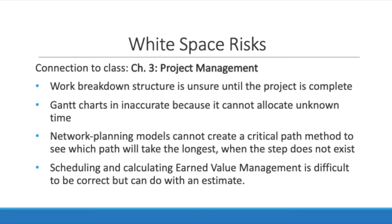This connects to Chapter 3, project management. You can't do a work breakdown structure because it is unsure until the project is complete — you are uncertain of these steps, which is why you put a white space in them. Gantt charts are very inaccurate because they can't allocate the unknown time. In network planning models, you usually want to create the critical path method, which determines which path will take the longest and is most important for slack time. With a white space issue, you risk not knowing which path is the critical path, as that step simply does not exist.